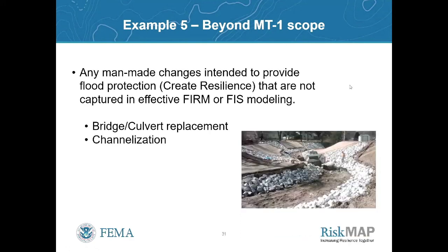Channelization: if you're changing the topography of the channel, improving it, protecting it from erosion, any of those things that alter the way it was when the flood insurance study was created, that's probably got to have an MT2 review, because it'll likely result in changes to the BFE or the discharge, the velocity, some kind of hydraulic change that may need to be studied and captured.